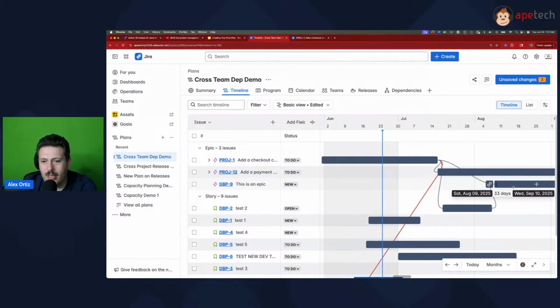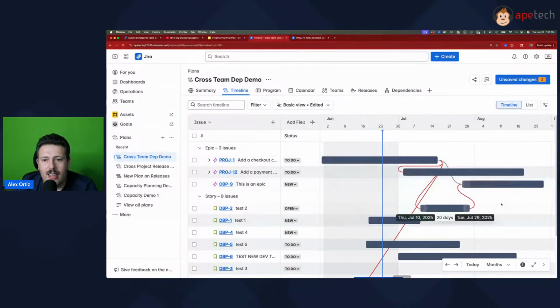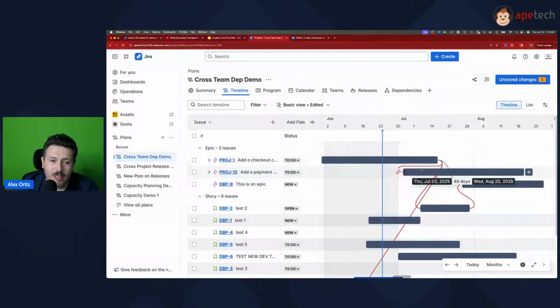But this is something you need to do, and you come in with facts and data. Because once you put those start dates and due dates in, once you connect those dependencies in your plan, now you can go back to the negotiating table and say, look, here's the plan, here's the reality. If we go down this path, we have a significant amount of overlaps that's not going to be healthy for us, right? We're going to have problems. So if your plan looks something like this, you're going to have some problems, because things are not going to be completed and other things are going to start, and you're just not going to have the right handoff to make this successful.